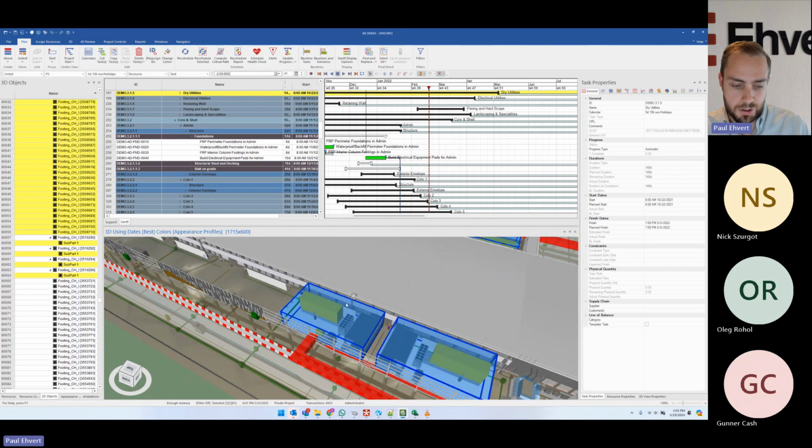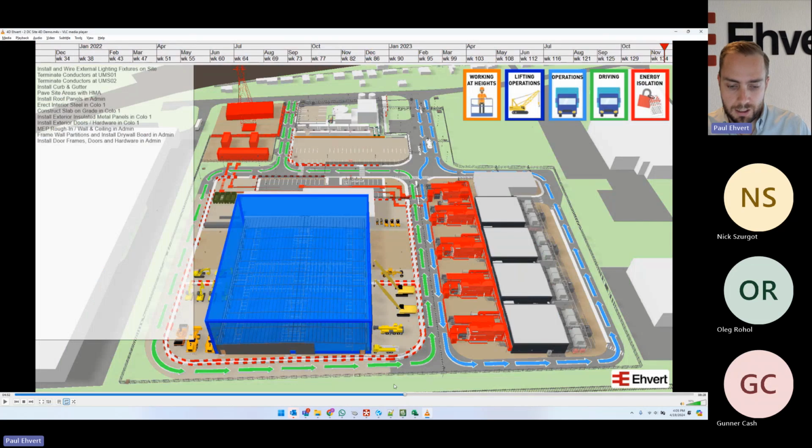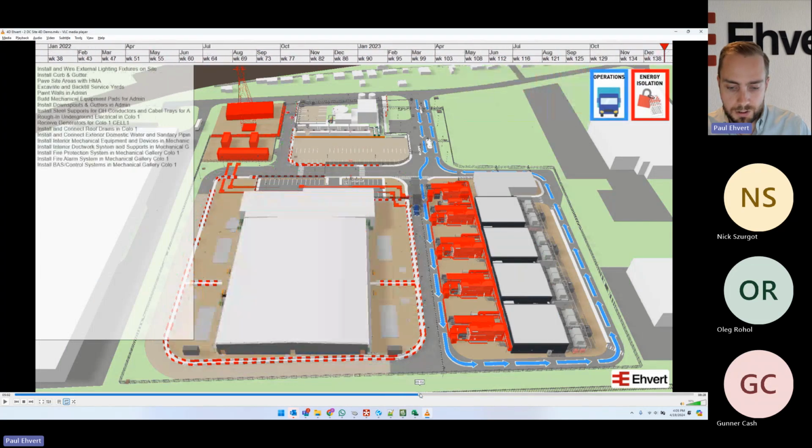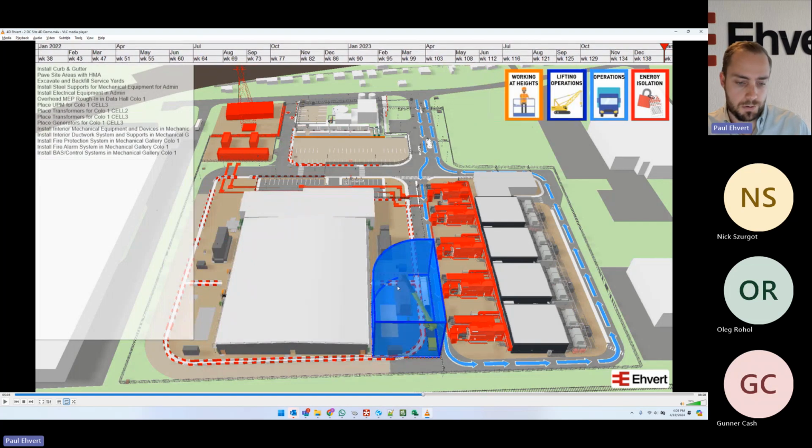We add this additional geometry for lifts and exclusion zones to help us check in a dynamic clash detection situation. So say we have a lift here, and if it interferes with something else like our crane swing, we'll be able to pick that up, similar to the way we've done our other clash detection. So we'll add geometry in for that.